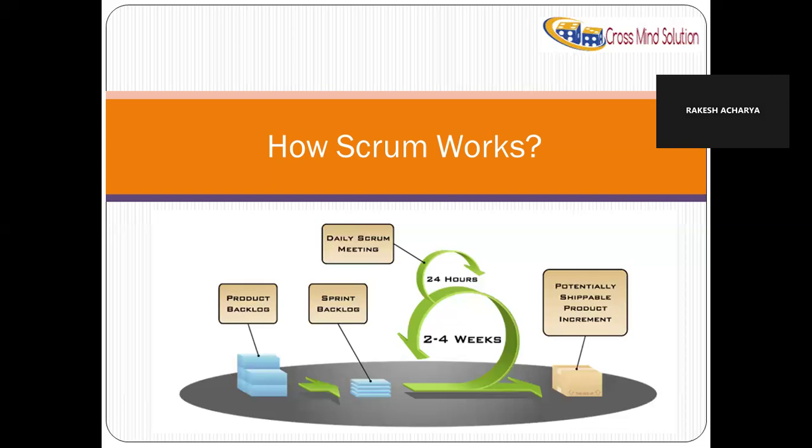Complexity is very low. But if I say I need the login page with validation, and complex validation at that, 8 characters minimum, one uppercase, one lowercase, one specific character, right? It is a little bit complex, correct? Correct. So I will say more effort will be required. I will say now it's not one story point, it's three story points.